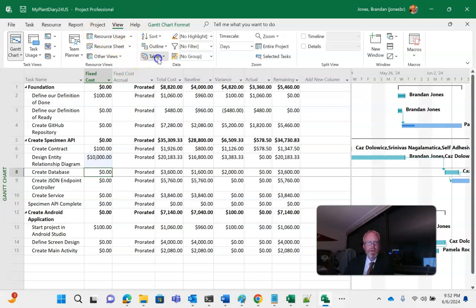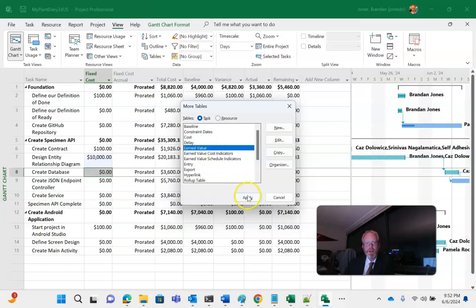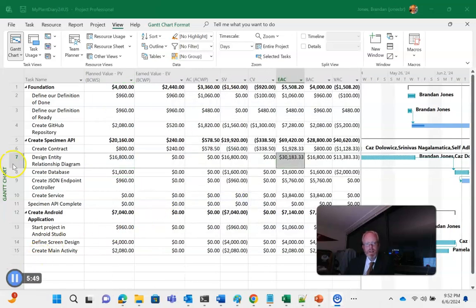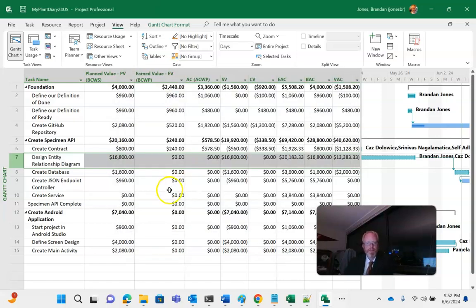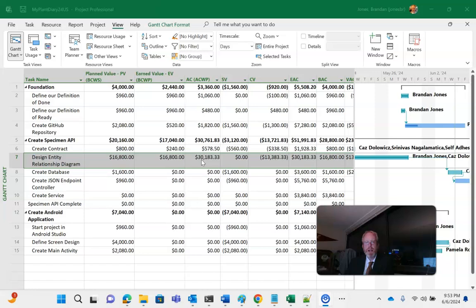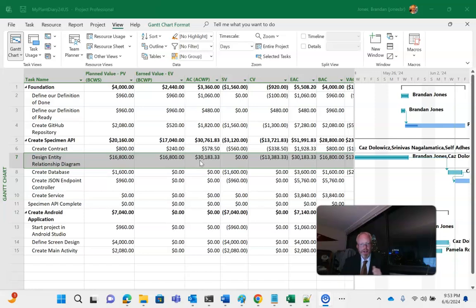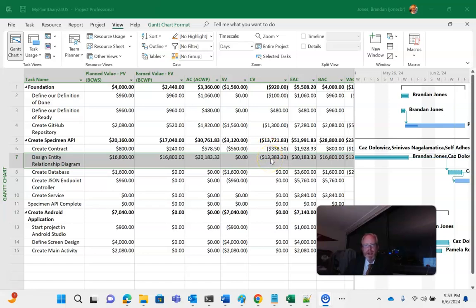Now from view, I go to tables, and I go back to more tables, and I go to earned value. Let's go ahead for this one. Let's say that we did complete the item. So here we see the plan value for this was $16,800. The earned value $16,800 because we've completed it. The actual cost of work performed, though, is significantly higher. Now you notice it's not exactly $10,000 higher. I will say in a previous video when I set the baseline, I adjusted some budget numbers so we could see how that would impact our baseline. So there's a little bit of carryover for that. But nonetheless, you can see there's a fairly significant increase in cost there. And then that's going to impact our cost variance in a negative way. And that will impact our estimated completion and several other factors.